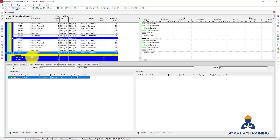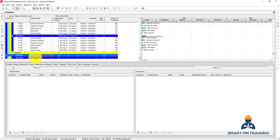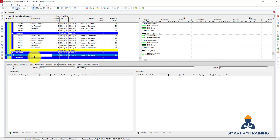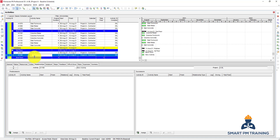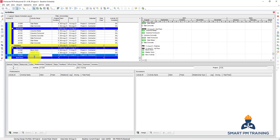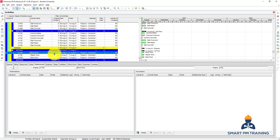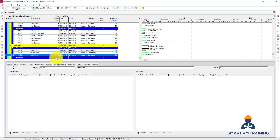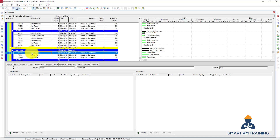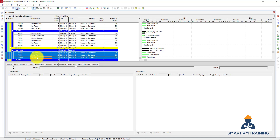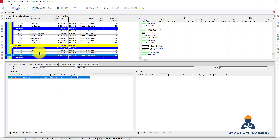For finishes I will add just a few activities: block work, plaster work, and paint work. Block work six days, plaster ten days, and paint work six days. If I want to link all of them in finish-to-start relationships, I can click Shift on my keyboard, select all, right-click and choose Link Activities. So they are all linked now: block work to plaster to paint work.